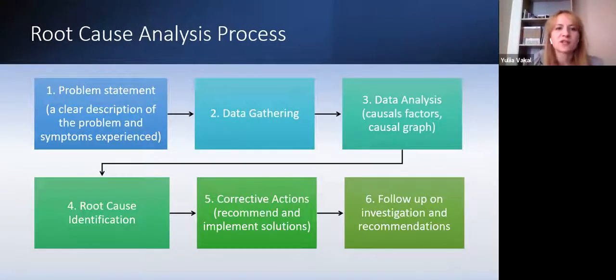So if we're talking about root cause analysis in general, the process could be applied to any technique. We start with a problem statement. It's very important to clearly describe the problem and the symptoms experienced. Because if it's written in a vague or ambiguous manner, it would be very difficult and probably a waste of time to do this root cause analysis. So it's very important to clearly state the problem.